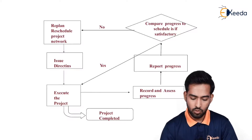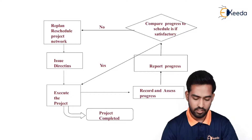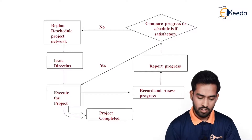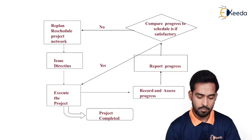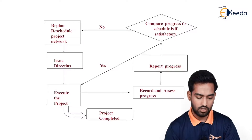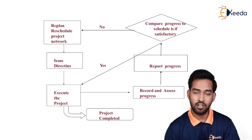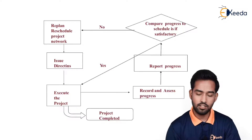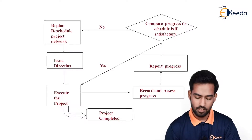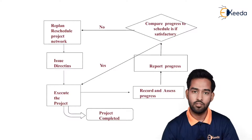In the flowchart, compare the progress to schedule. If satisfactory, continue the flowchart accordingly: replan and schedule the project network, issue direction, execute the project, and reach module completion — that is, we have to reach the project completion phase. If there are some problems, we continue through the flowchart to resolve them.